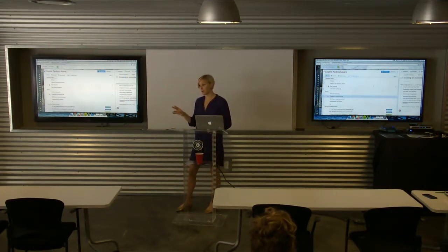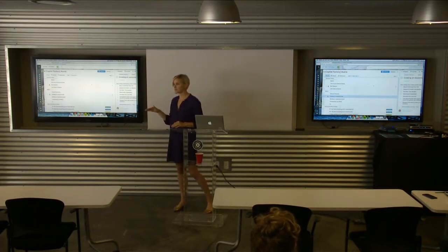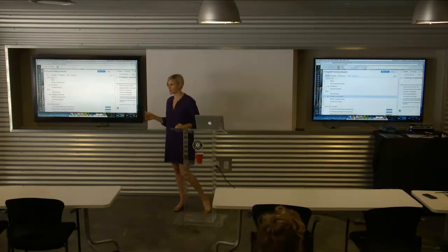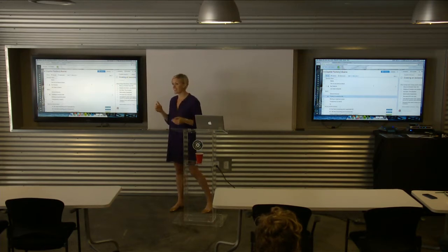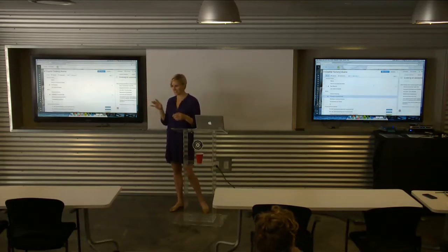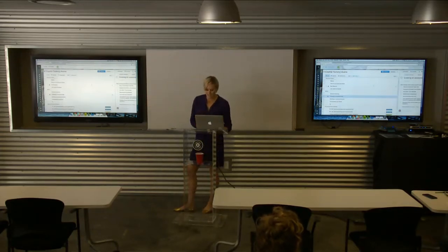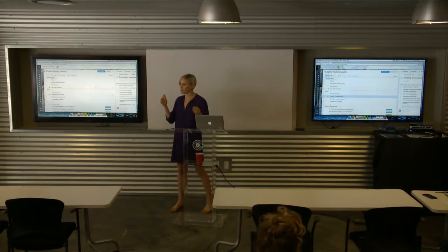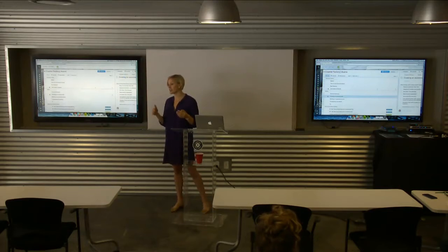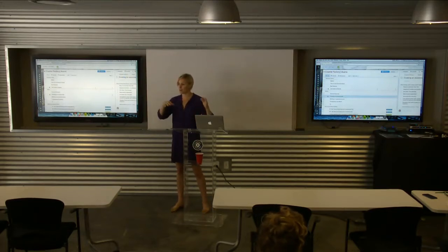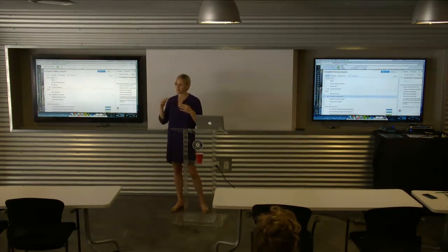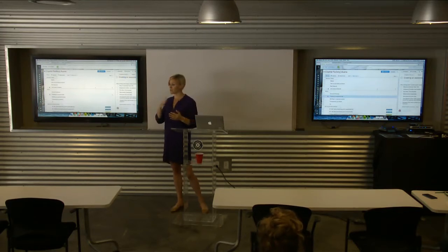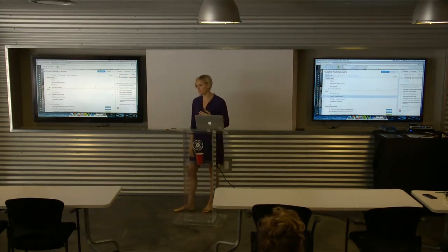It's a little bit of both. It's more task-based. It has the project management aspects, but in a much more lightweight fashion than something like Project. We have integrations with third parties to bring in things like Gantt charts, and dependencies are not great. They're my number one wish list item. So it's a little more lightweight: we map it out and use the communication structure it has built in to say, we're running this project, we have all these people involved, and we're having our back and forth, but it's not stringent in the way of you have something to do and it's blocking me, the way Project is.